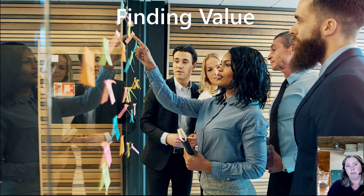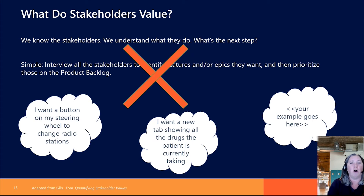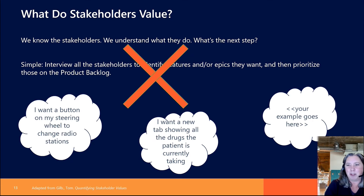Once we know our stakeholders, it should be simple, right? We just go talk to them, get a bunch of features and epics, pop them in a product backlog and off we go. Not so fast. This is actually the really important and tricky part — people come to us with their solutions, with what they think will solve their problems. So they won't tell you their underlying goal; they'll say something like 'I want a button on my steering wheel to change radio stations,' or 'I want a tab showing all the drugs a patient is currently taking.' This isn't value yet. We're in the solution space, not the problem space.